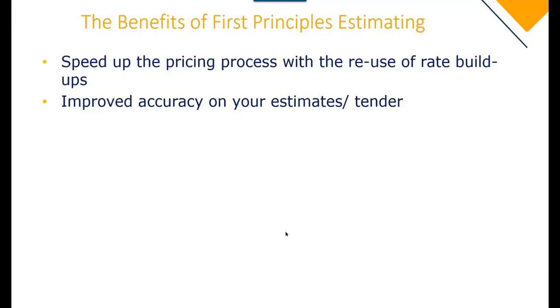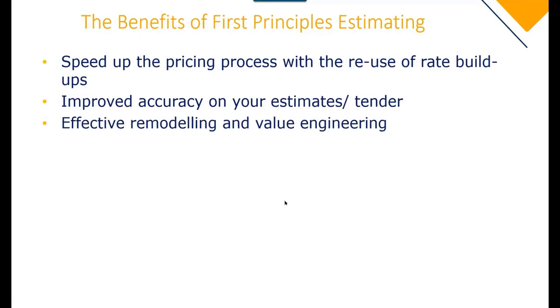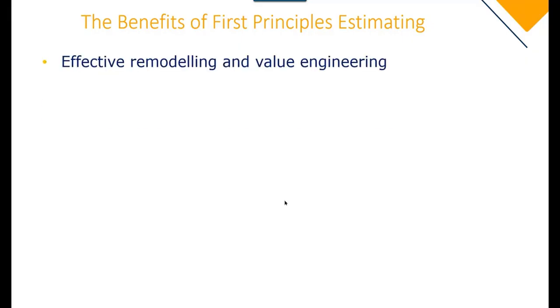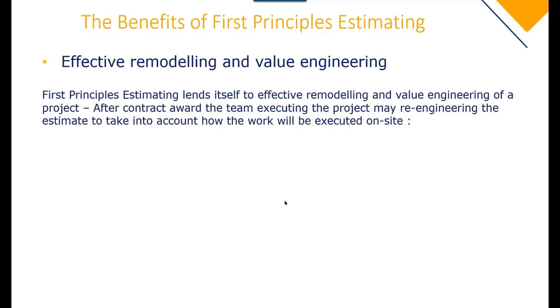So just continuing with the benefits of first principles estimating. Another one would be relating to post-tender aspects. And this typically would happen once a contract has been awarded and the team on site would need to re-engineer the estimate to take into account what's going to be happening on site. So first principles estimating lends itself to re-engineering the estimate. But after the contract award, the team executing the project may re-engineer the estimate to take into account how the work will be executed on site.